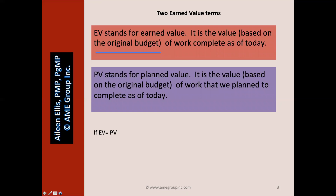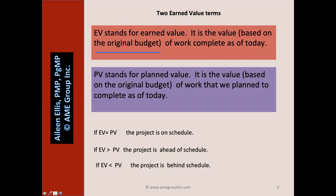If EV equals PV, it means the project is on schedule — the work that is complete equals the work we planned to complete as of today. If EV is greater than PV, we're ahead of schedule; we have more work complete than planned as of today. If EV is less than PV, the project is behind schedule — we have less work complete than planned as of today. Make sure you understand these three ideas before you move on.